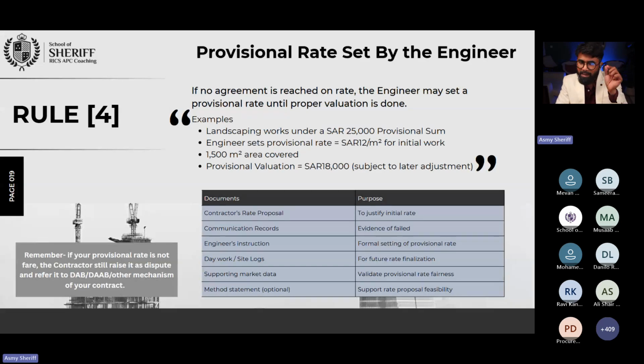One specific term we call for this rate. Very good. Star rate. The rate that will be decided by the engineer using his prerogative, using his freedom or discretion. He is going to set the rate.